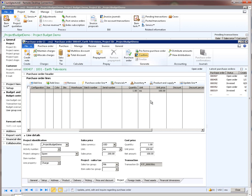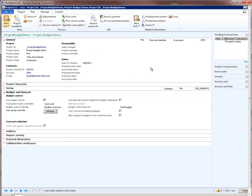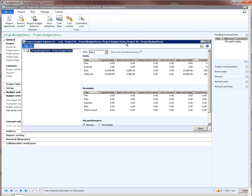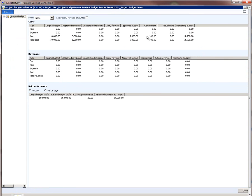Now let me confirm this purchase order. The purchase order is now confirmed. Let's go to the project and see what impact this purchase order had on the budgets. We go to the control tab and here we see the project budget balances form. If we click this form, we see that there is a commitment of $100 booked against the item budget. This is correct because the purchase order line was for a phone that cost $100, and hence the remaining budget is now $14,900.